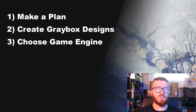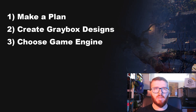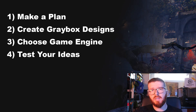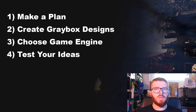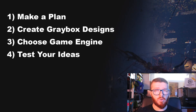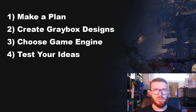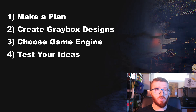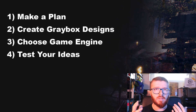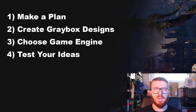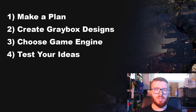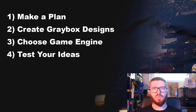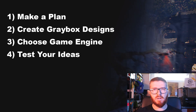Tip number four is to test your game. This doesn't mean only testing it yourself, but also giving it to friends or other people to play whenever you're finished with your gray box design. Of course, test it not only at the gray box stage but at every other stage as well. Create a list of milestones in your plan, and after each milestone give it to a friend and start testing.